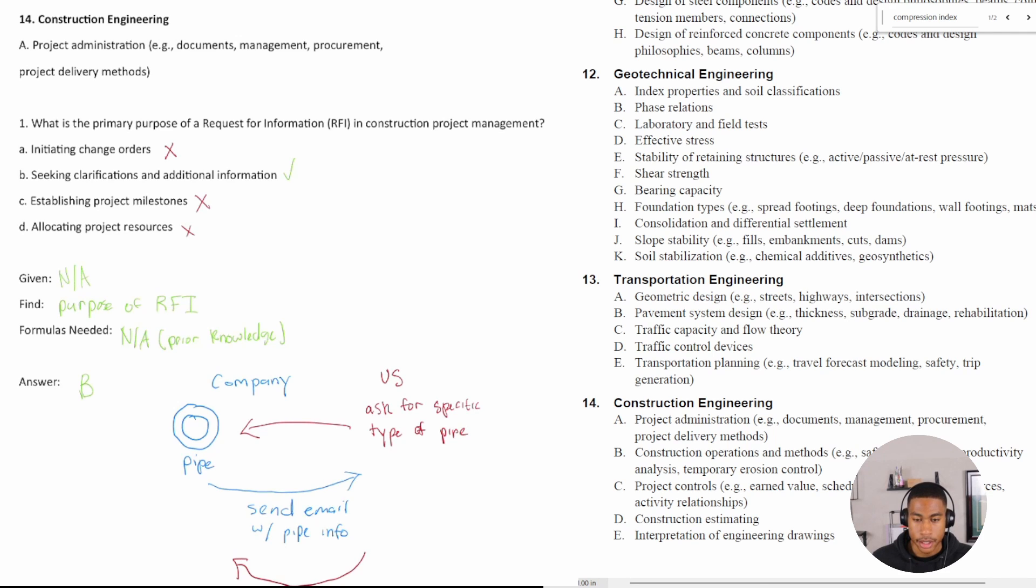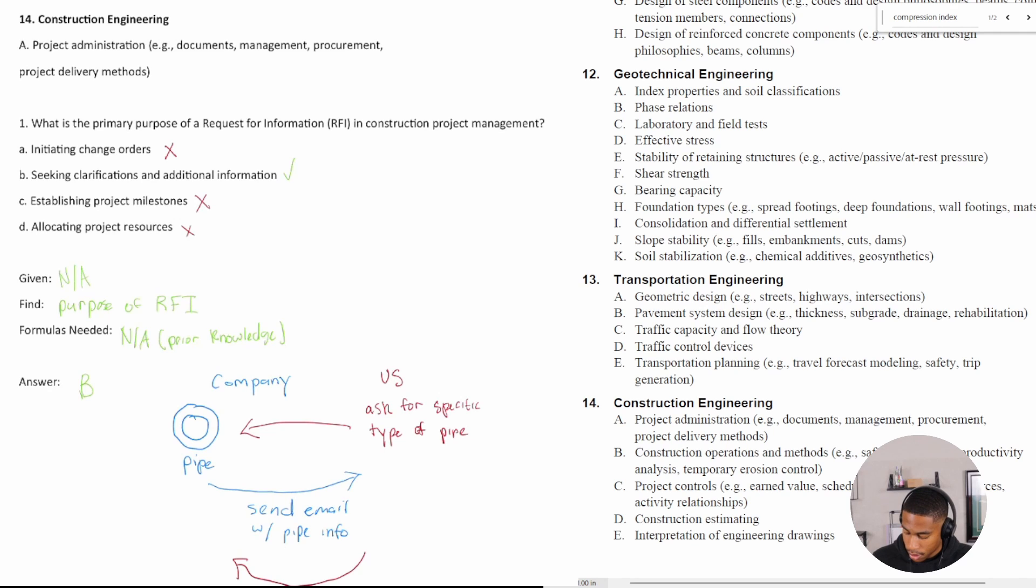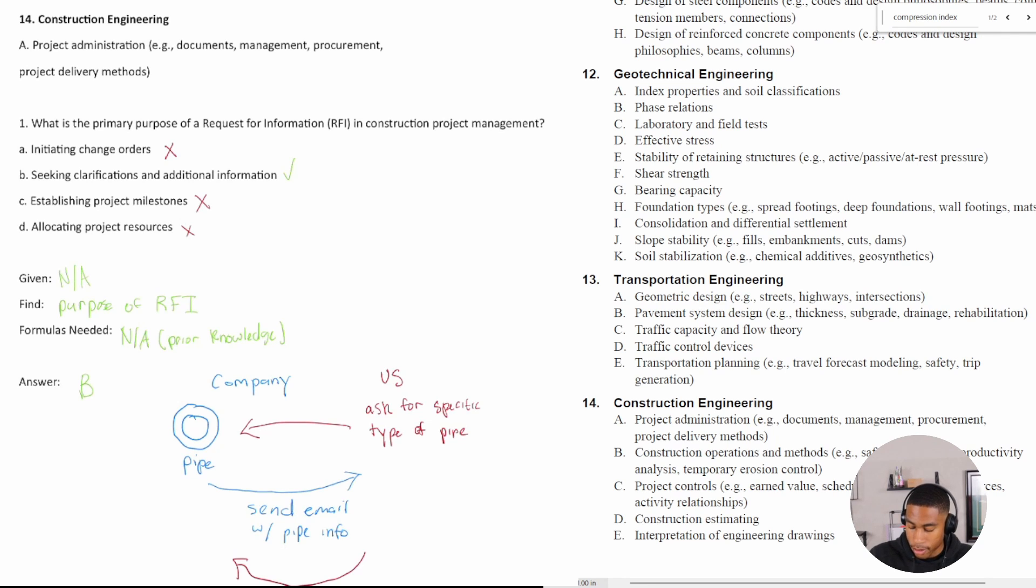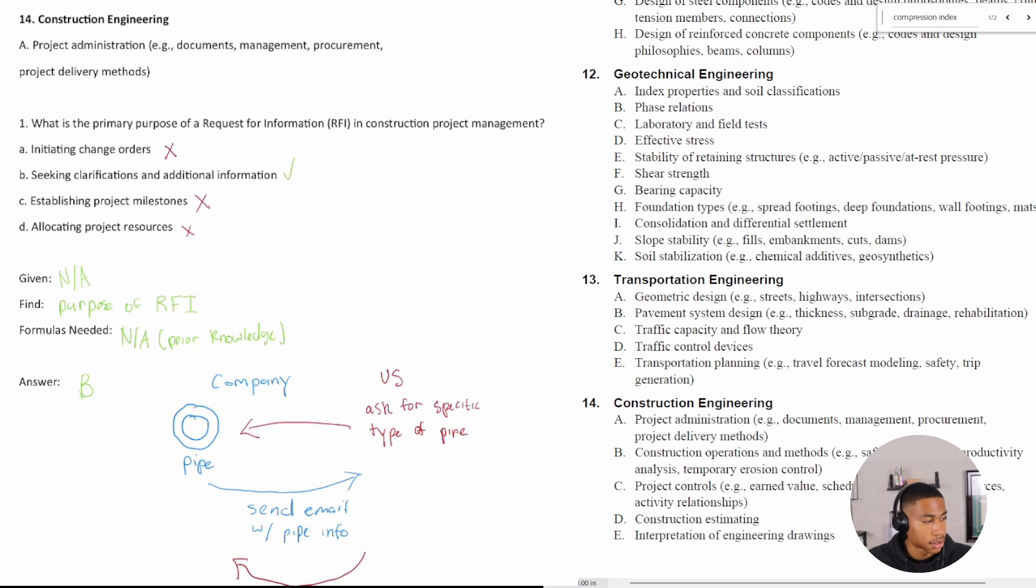So then we'll send them another email and we'll do a request for information saying, hey, does it have a specific material? And it's kind of this going back and forth between the company who's selling the products.